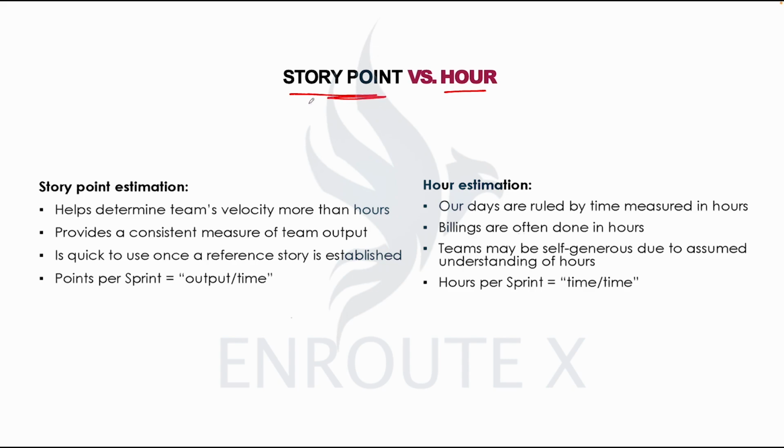But just note that estimating a story point is different from estimating in hours. When we estimate in hours, we want to look at how long in time it will take. But story point is looking at the effort in relation to what you have done previously. Yes, again, that video I shared earlier expatiated on the two also, so you may want to check that up. But again, when we get to the practical, we will look at this further.